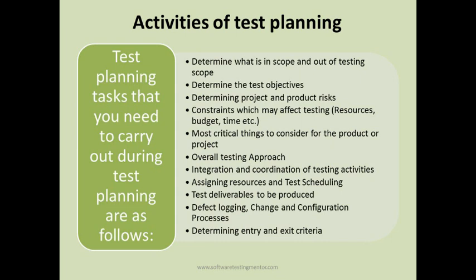You also need to consider any critical aspects of the product or project, define the overall testing approach for the complete project, and plan integration and coordination of testing activities. This includes assigning resources — determining which resources will test what — and defining the test schedule, including when each testing phase starts and ends. Any agreed test deliverables to be produced, such as a test summary report, test plan, test strategy, and manual or automation scripts, are also determined.